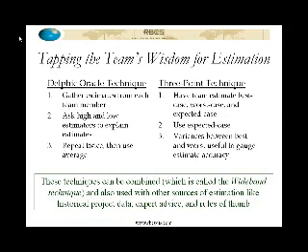This is how long it's going to take. Really, for every task, there's a probabilistic distribution of how long it's going to take from a likelihood point of view, right? And so we can talk about the worst case and the best case at either extreme of that distribution, and then the expected case in the middle. So let's identify what the best case and worst case effort and duration are, and capture those.